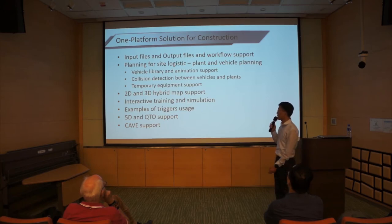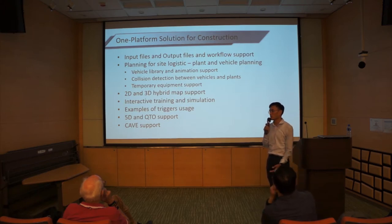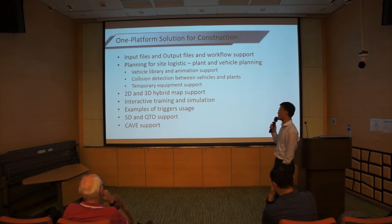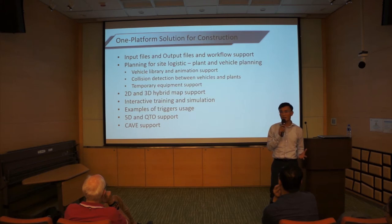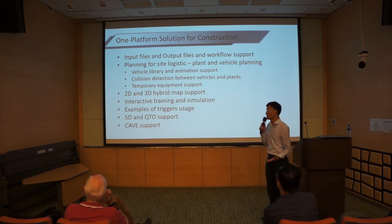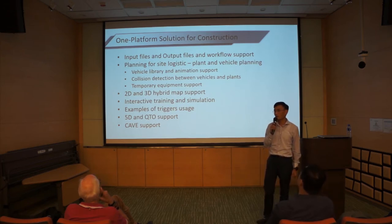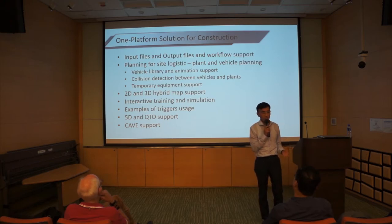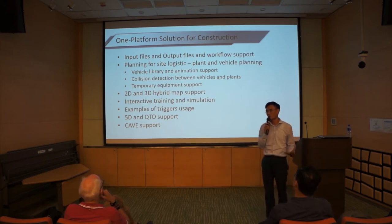We have so many vehicles you can use, with pathing that includes what I call turning radius settings — so you can figure out the turning radius when big trucks come into your work site. I also added collision detection because that is real simulation — when those plants come in, you want to make sure they're alive, not interpenetrating. It will give you warnings if they collide. Also unique to us: we support 2D. Our 3D generates 2D automatically, so if you make any changes to your 3D — especially safety equipment — it will print back out on your 2D sheets for the foreman and safety officer.